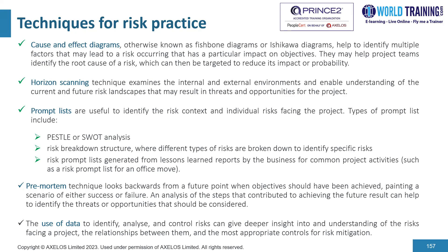Types of prompt list include PESTLE — which stands for Political, Economic, Social, Technological, Legal, and Environmental — and SWOT analysis, where S stands for Strengths, W for Weaknesses, O for Opportunities, and T for Threats. You also have the risk breakdown structure, where different types of risks are broken down to identify specific risks, and risk prompt lists generated from lessons learned reports for common project activities, such as a risk prompt list for an office move.